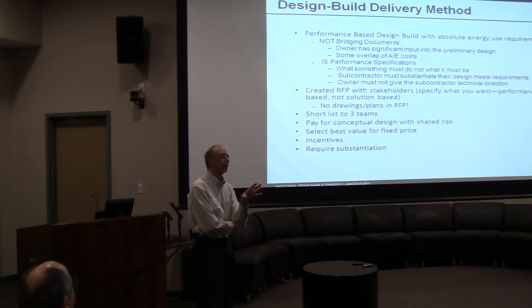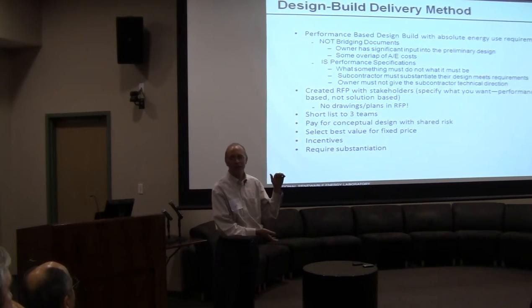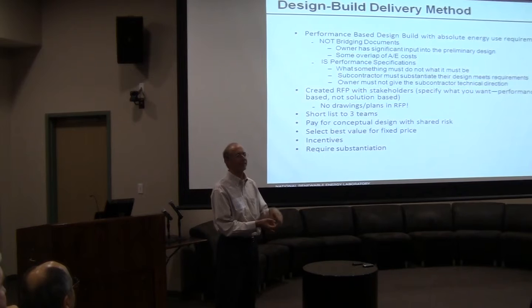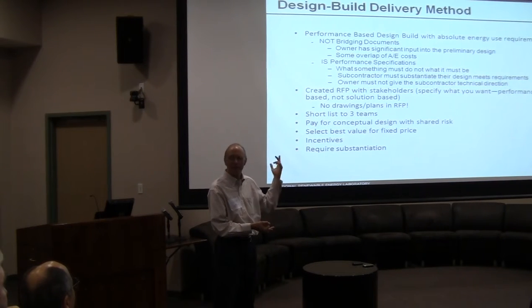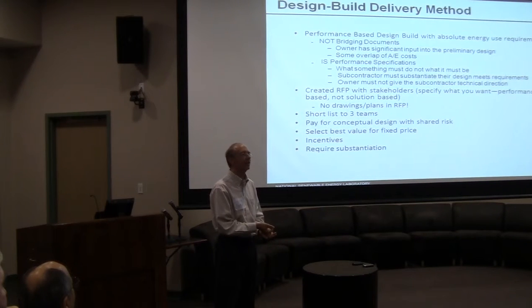Because what it did was it really aligned people to listening back to the owner outside of what the contract might say. It was really for people pleasing, if nothing else. And it was a one-sided dialogue. Every month we had a list of criteria, things like safe design, meeting energy goals, basically that criteria you saw. And we would score the team on how we thought they were doing in achieving that. And if they met expectations, guess how much money they got?